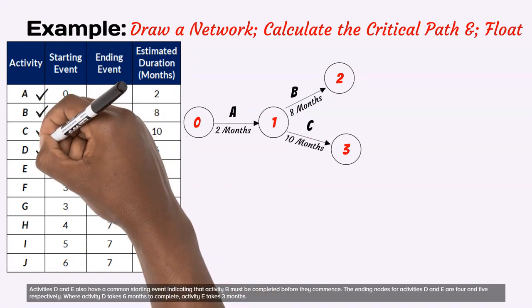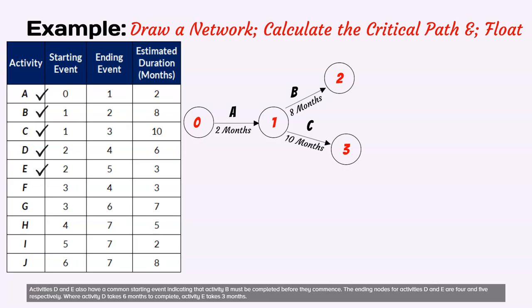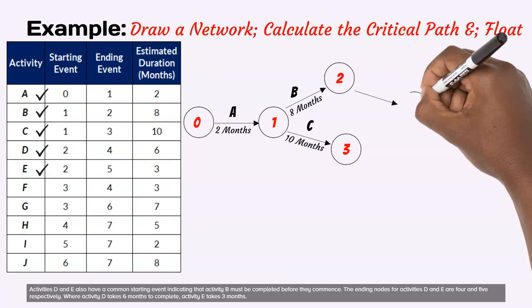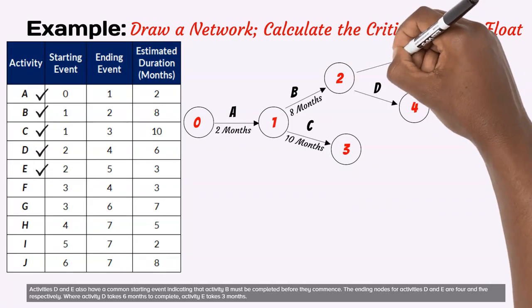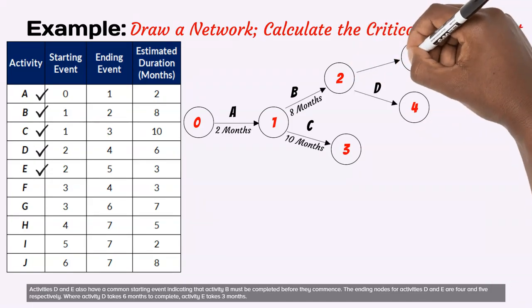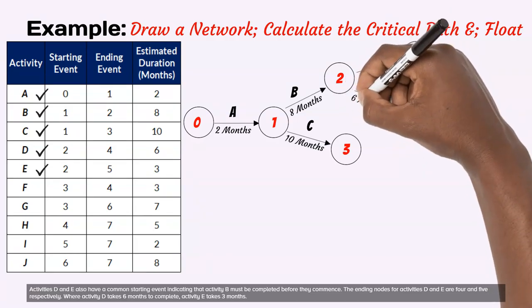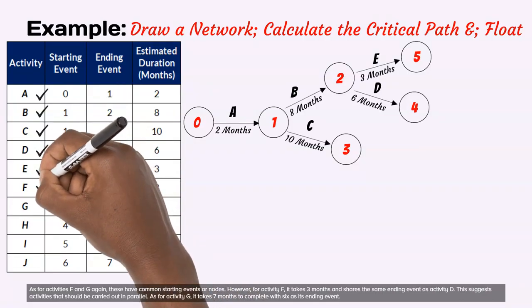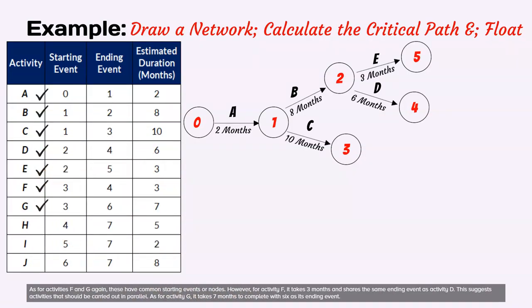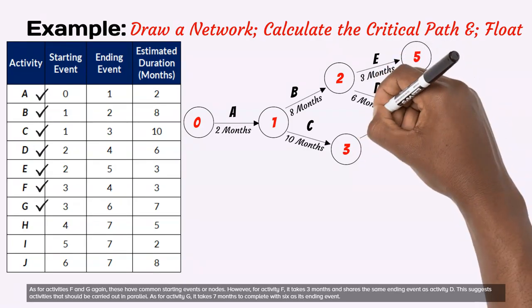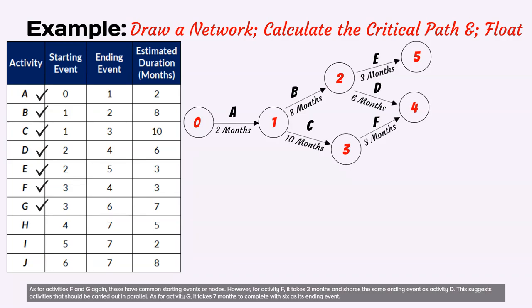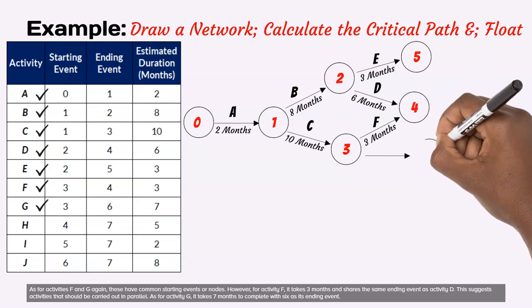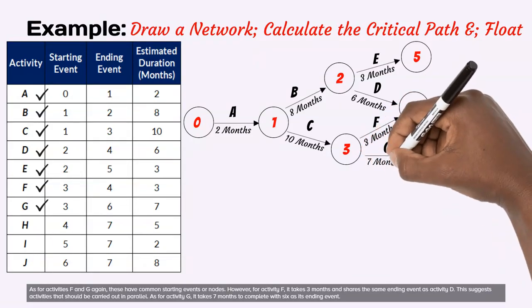Activities D and E also have a common starting event indicating that activity B must be completed before they commence. The ending nodes for activities D and E are 4 and 5 respectively. Where activity D takes 6 months to complete, activity E takes 3 months. As for activities F and G, these have common starting events or nodes. However, for activity F, it takes 3 months and shares the same ending event as activity D. This suggests activities that should be carried out in parallel. As for activity G, it takes 7 months to complete with 6 as its ending event.